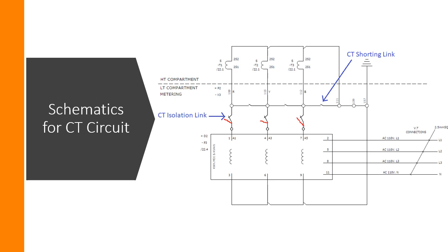Before energization, make sure the isolation links are in the closed position. If the shorting link has not been removed, what will happen is that current from the CT will go back through the link. So before commissioning, the isolating links must be closed and the shorting strip or shorting facility must be disconnected from the terminals. These two actions must be done before energization.